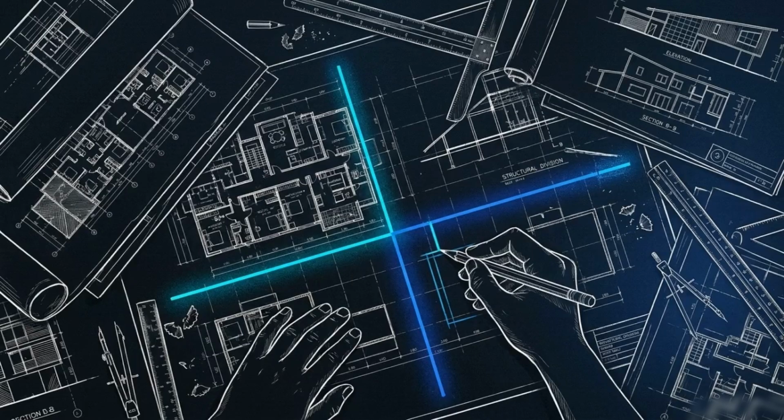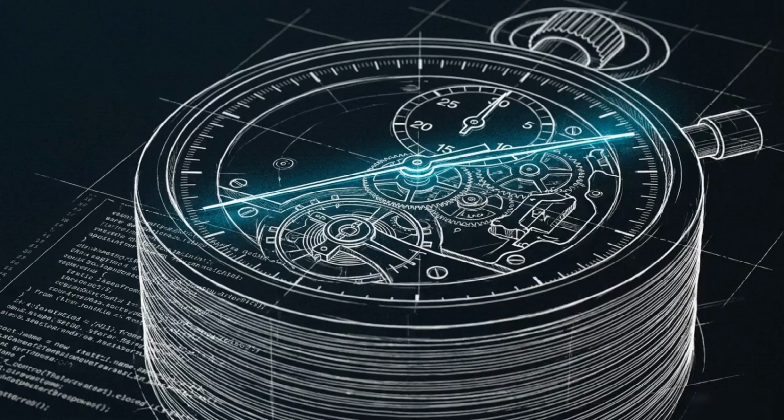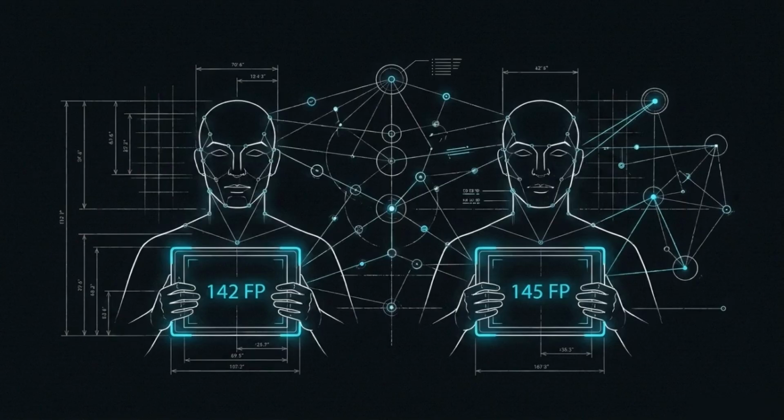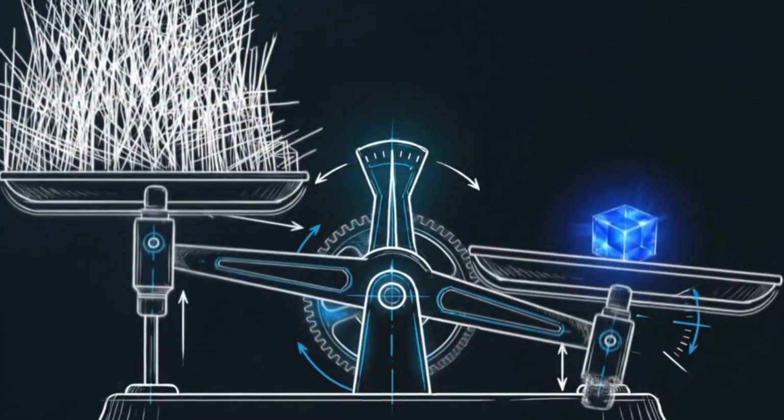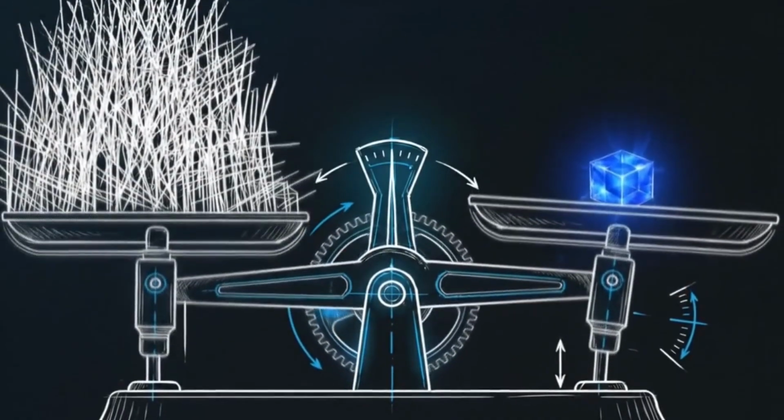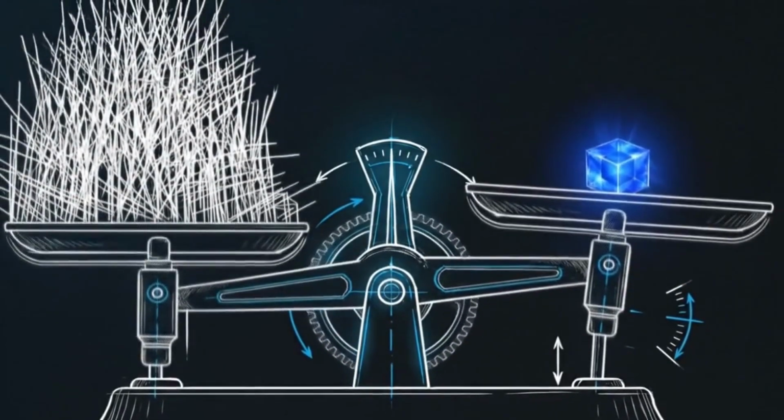This precision requires a practical trade-off. Classifying the 5 architectural components is a highly manual task. It is significantly more complex and time-consuming than running an automated script to count code length. Accurate function point analysis requires trained analysts. Relying on human categorization means two analysts might produce slightly different point estimates for the exact same system. It is a heavier analytical tool. Yet sacrificing the cheap simplicity of counting text lines is the mandatory price for achieving cross-technology accuracy.